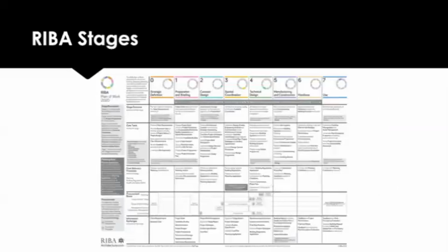So over the remaining slide, I'm just going to go through the RIBA stages. RIBA stands for the Royal Institute of British Architects, and it's a very well-known terminology to talk about RIBA stages in terms of where a project is as it moves through these different stages. So when we go to tender, we have a choice about whether we go at RIBA stage 2, where it's just a concept, and a supplier can come and design and build.